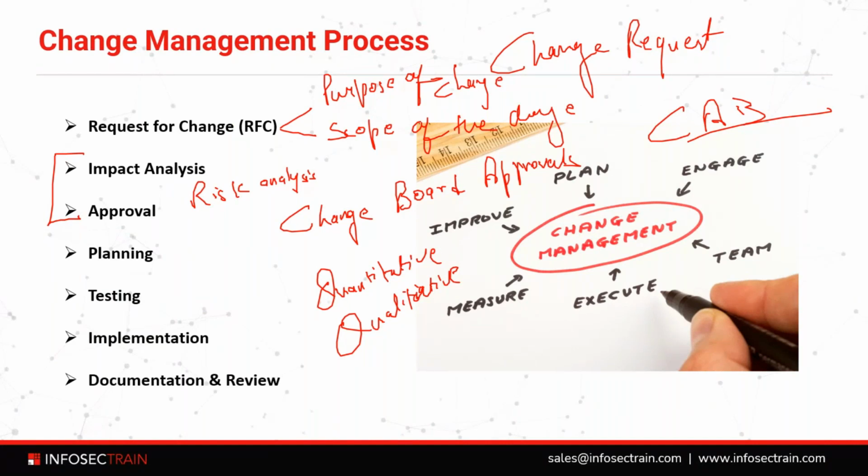So this could be expressed as a discrete value or as a traffic light type of indicator, where red means high risk, orange means moderate risk, green is minimal risk. So if the change is approved despite a high level of risk, stakeholders must be informed of these risks, so that they can anticipate and react to them appropriately as the change management project proceeds.